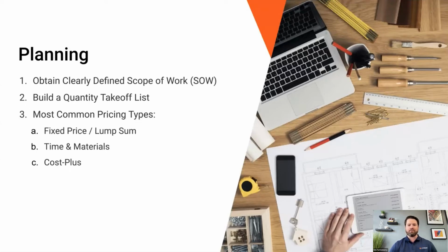If we're going to do time and material, which we weren't able to get away from entirely, for example, service type work. If a customer calls and has got a flood, they don't want you to sit there and take the time to build out a quote for them to approve. They basically want you to immediately deploy some guys to get out there to get it fixed. And so that's where it does make sense to have time and material pricing in place for those customers if you're doing service type work like that.